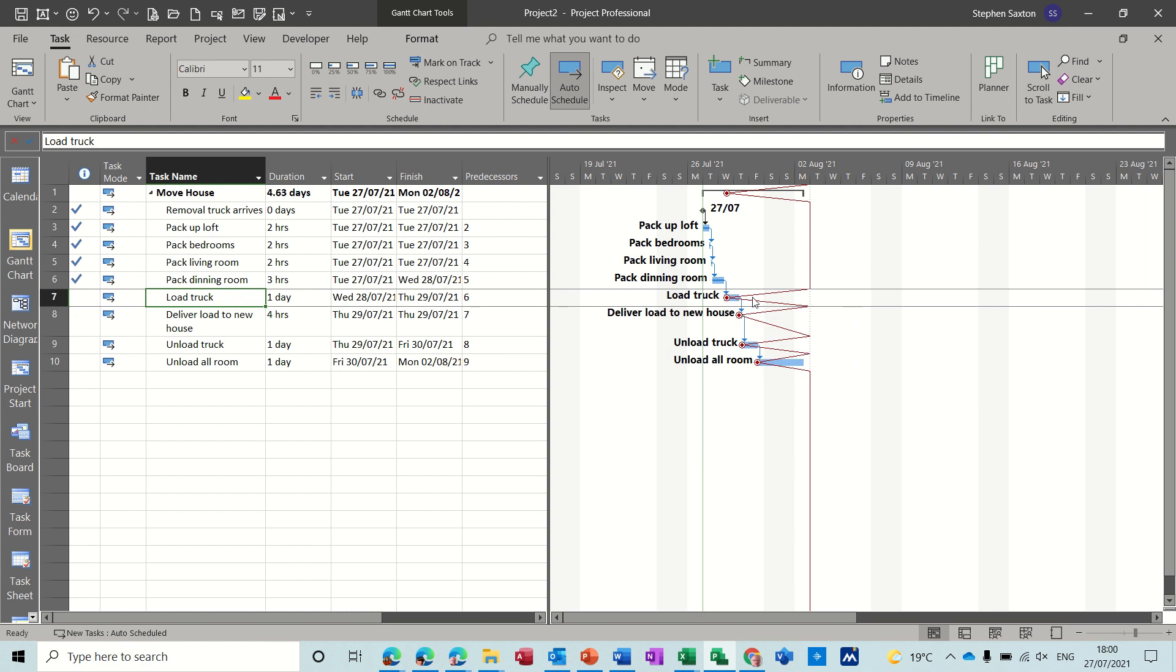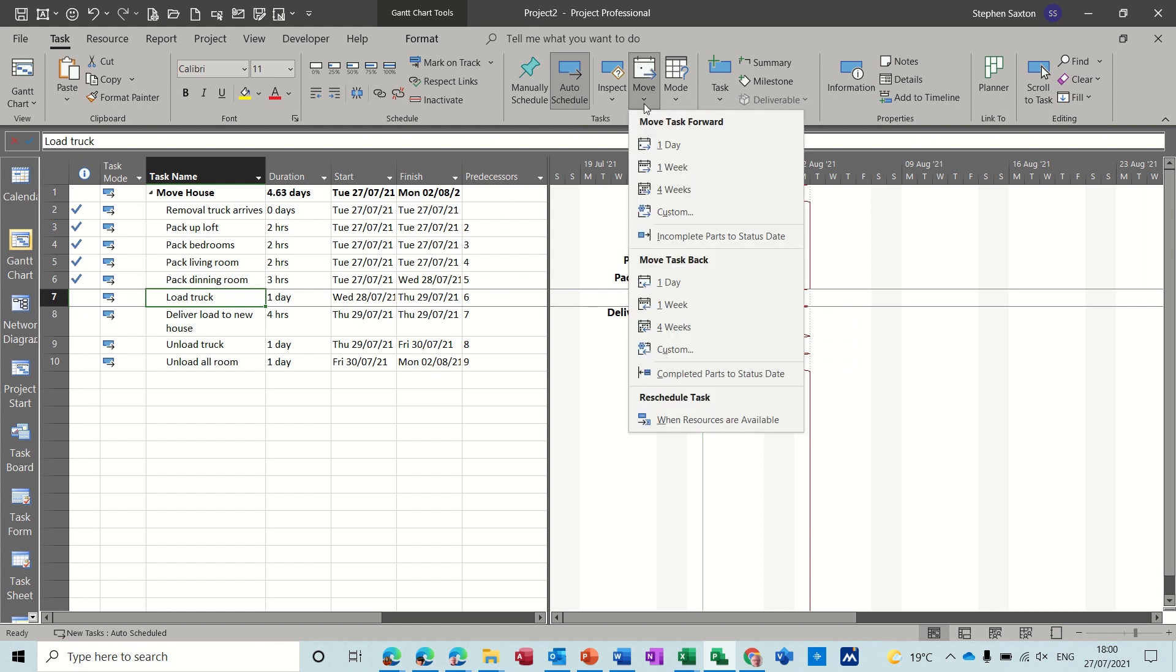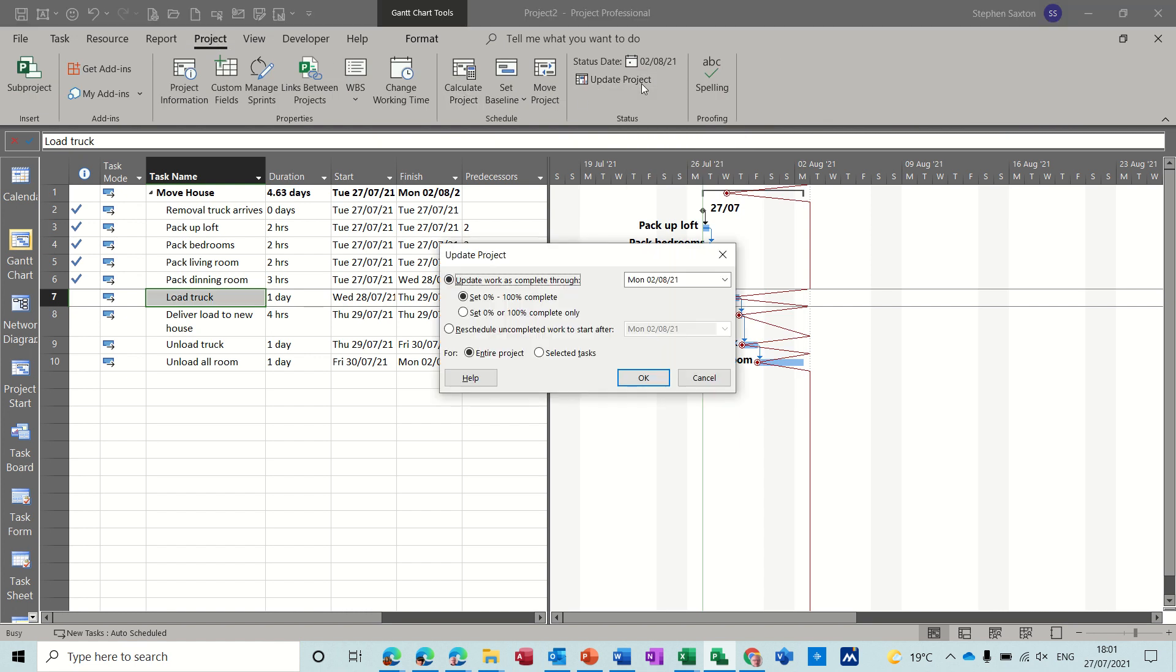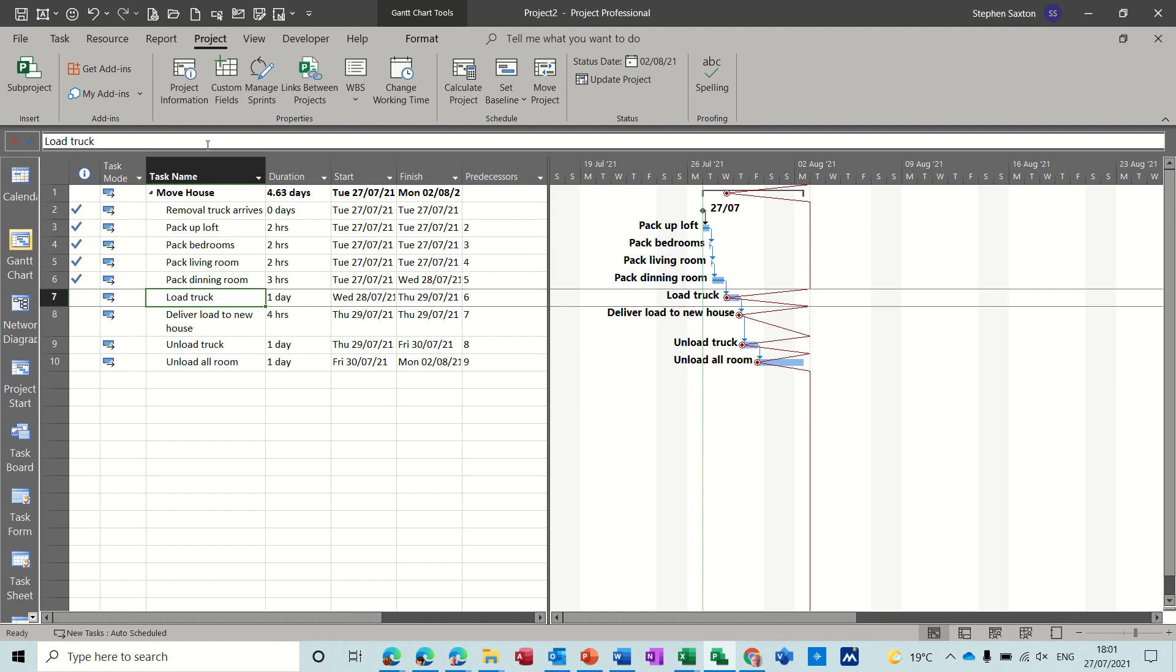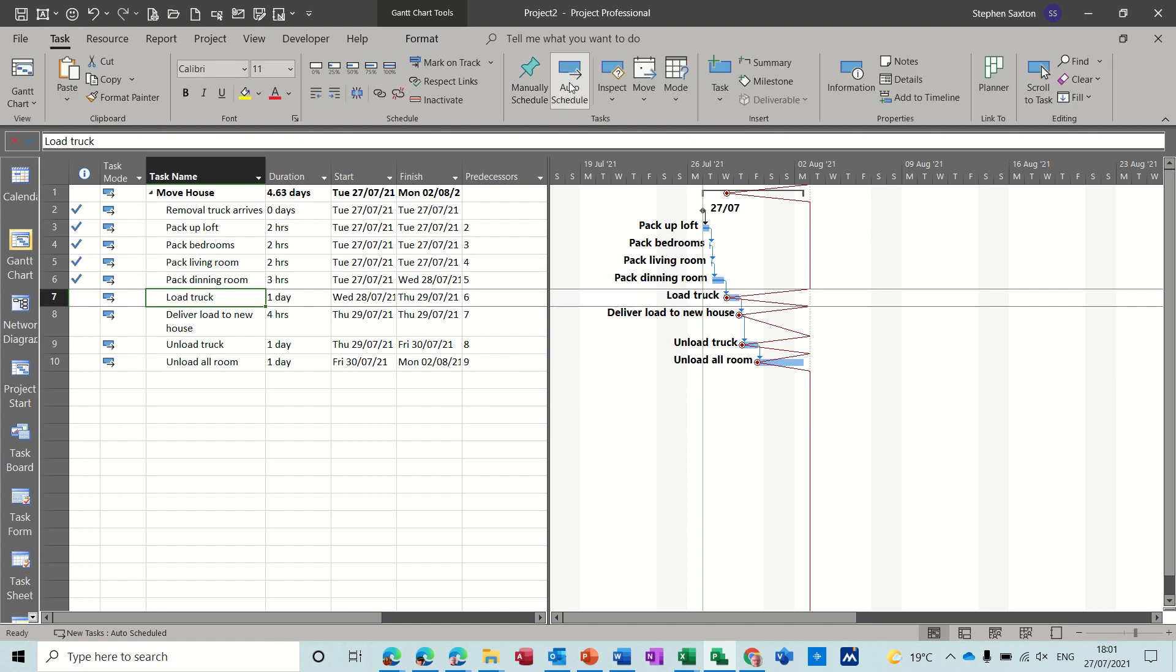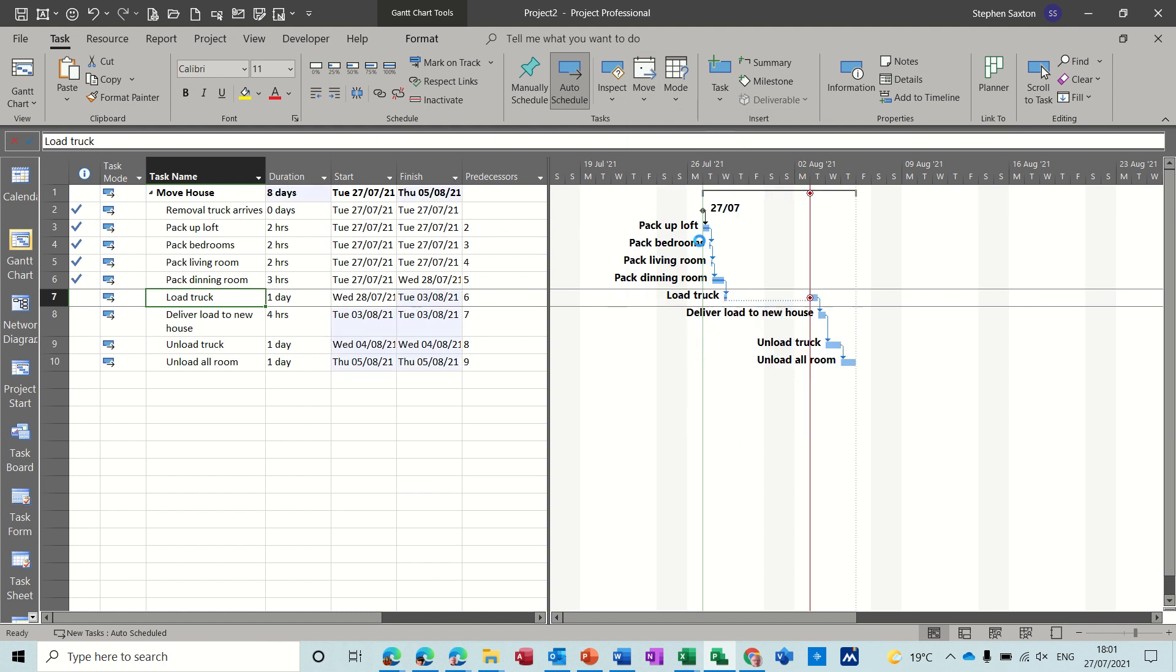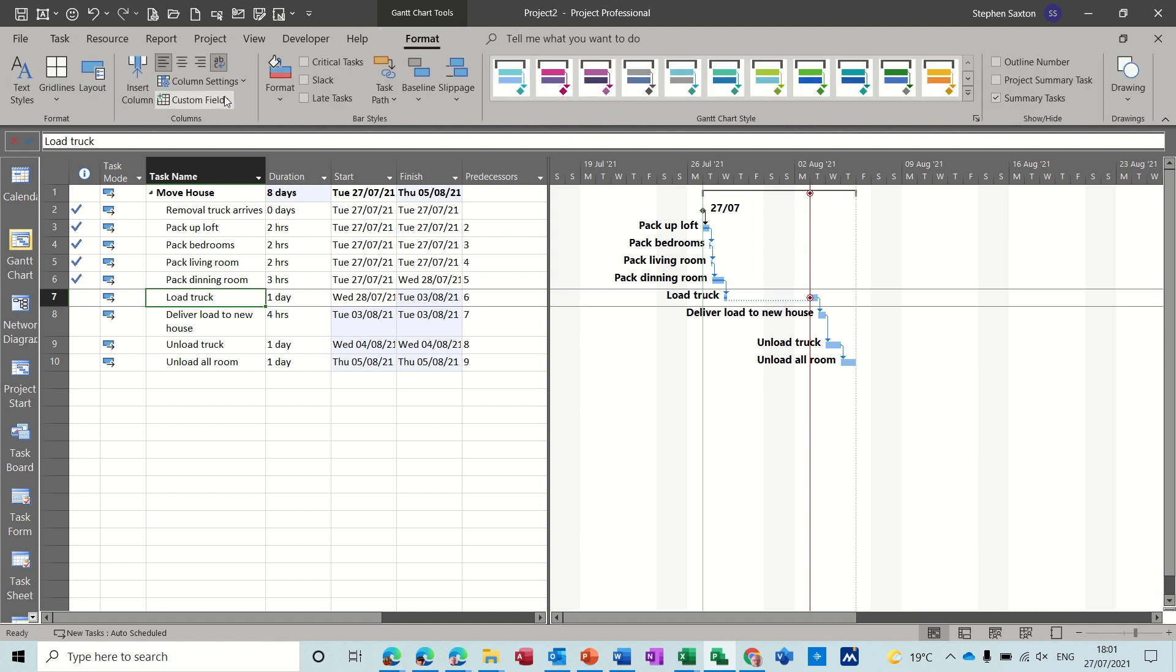And what you can do also is on the project tab and the task tab, you've got an option to move incomplete parts to the status date and you've also got that on the project tab if I go update project reschedule. Uncompleted work to start after the status date which is there, remember we set that. So I'll go back to the task option because I've got a bit more information on it there. So if I do that one you can see what it's done there, so that bit's completed so it's moved everything across like so and you can now see the status date showing there. Now if I go back into format and progress lines.